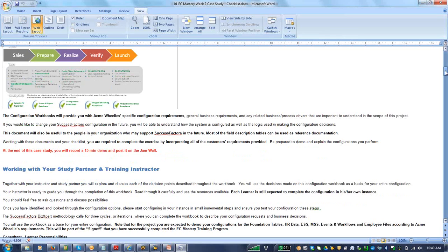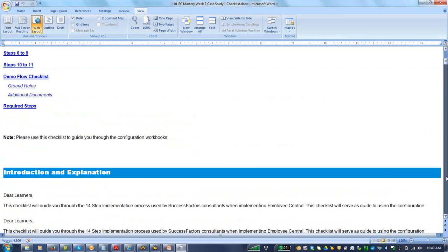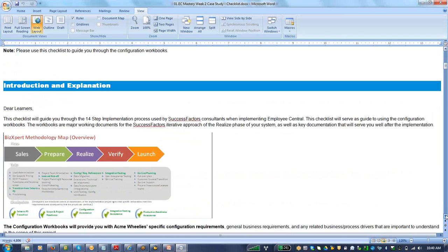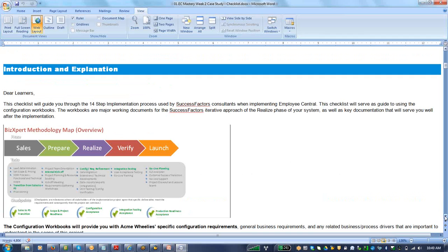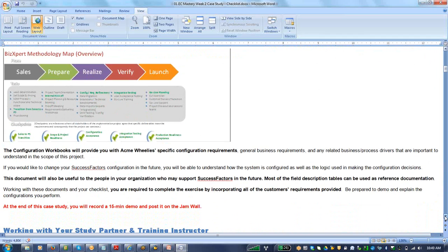First is the sales phase. The sales team initially does the product orientation demo and sells the product, and the customer is convinced and purchases the license. Next is the preparation phase, wherein the team is prepared in the sense of who will be the members of it, how many consultants will be there, who will be there on the business side, and who will be there from the partner implementer side. Other things are formulated like milestones, and then kickoff is done.